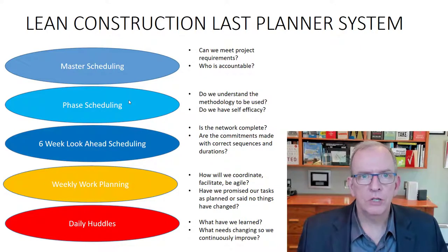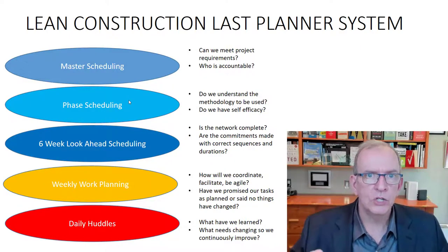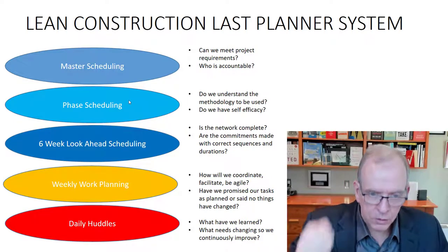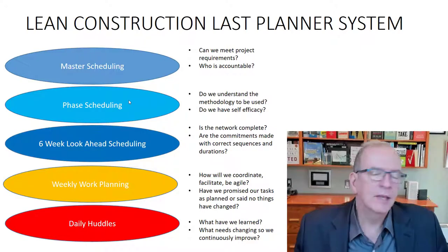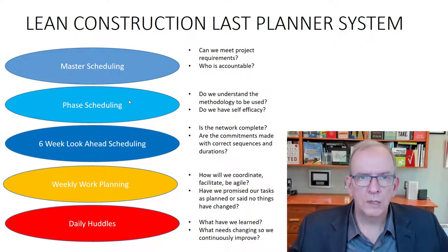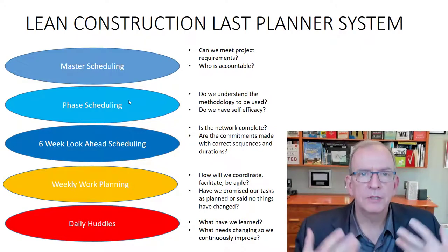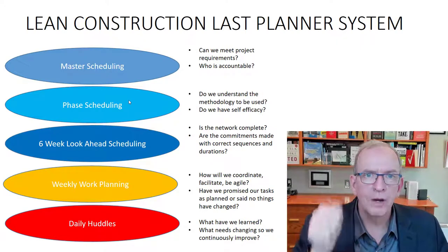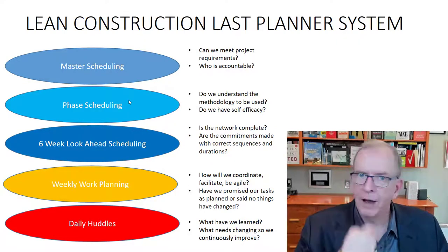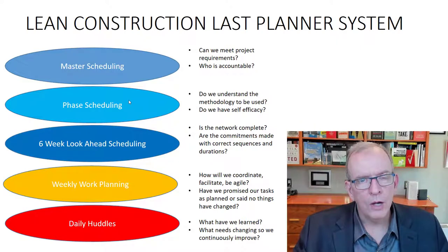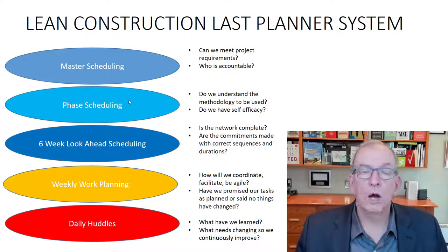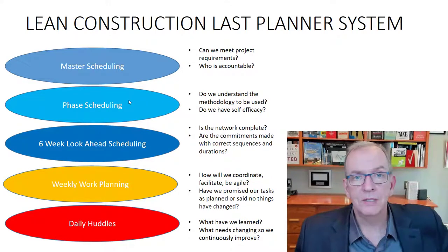That's where the traditional method falls down when we talked about being autocratic in the traditional method. You know, you're going to get this done and you're going to do this and kind of beat them into submission until they say yes, and then it still doesn't happen. Well, with Lean, we're trying to get that collaborative involvement. And if they can't do it, we're trying to find out why. 5 whys technique, and detail that out, root cause, and then remove that root cause or work around it because it's not going to get done. At least we know ahead of time.